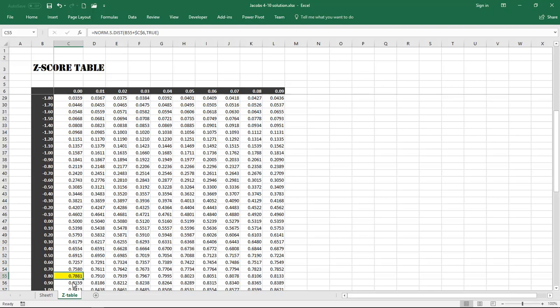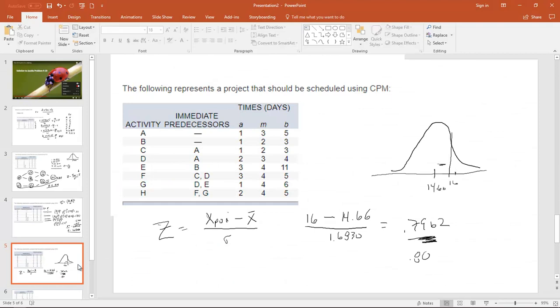Okay, so what does this say? It says we're pulling out the fact that it's 79%, 0.7881. Let's round it to 0.79 or 79%. There's a 79% chance of hitting day 16. That's what we just figured out. So try to go over that again if it's not making absolute sense. It really should start making sense because we're working on a very visceral understanding of how it all fits together, and we're looking at the derivation of all of it.